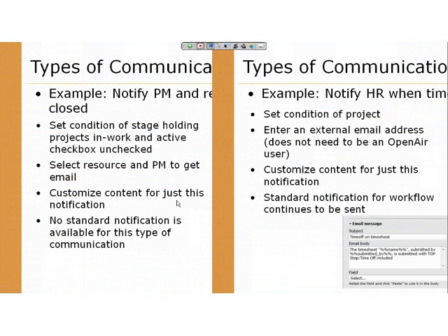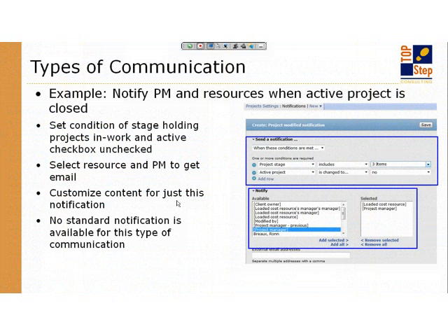Here's another one that, as I was coming up with some of these scenarios, I thought might be a good one, and that's notifying the PM and the people who are on the project that the project is now closed. Typical scenario: project's closed, people try to put a timesheet in the system, they can't find the timesheet, or they can't find the project, or they try to submit the timesheet and they get that error message, this project is no longer active. So now you're trying to figure out what to do at this time. You're calling up people to fix your timesheet. What about letting them know that something's been closed the minute it's closed?